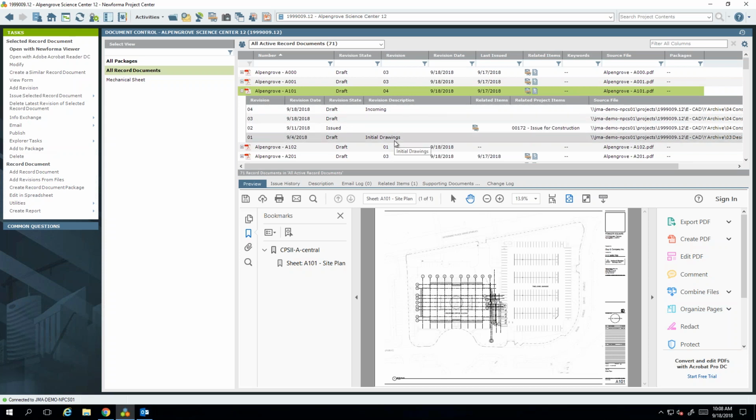And I assume that if we want other users to see the same documents on Info Exchange, we would have to kind of reissue these documents that we just received. Yeah, you would have to issue those if they were external people. Yes, you would have to issue. And that way everything will be on Info Exchange, like our drawings plus all equipment vendor or whoever is sub-vendors, whoever is submitting the documents. Right, it would be the latest and greatest. Whatever you highlight and you issue, that's what they would see. They would always see the latest and greatest ones.